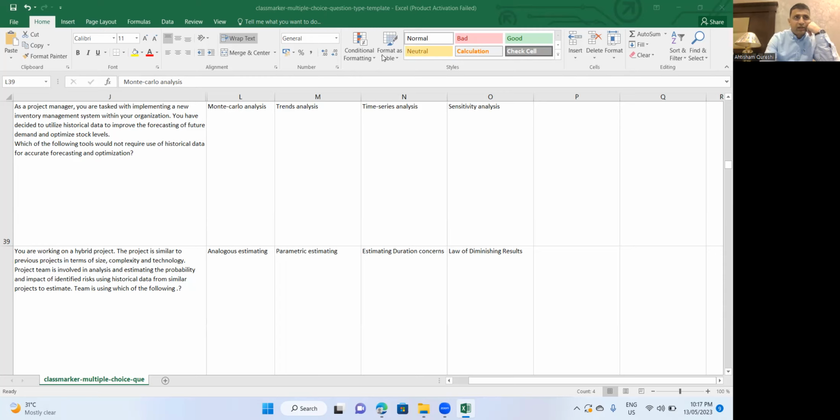The output will tell you that there are 80 to 90% chances that you will finish within your desired duration, let's say 18 days. But you would not reach this confidence interval without using the statistical model.